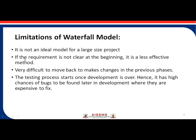The limitations of the waterfall model: it is not an ideal model for large-size or completely new projects. If requirements are not clear at the beginning, it is less effective. It is very difficult to go back and make changes to a previous phase — for example, moving from testing back to coding is not possible. Also, testing starts only once development is over, leading to a high chance of bugs found late that are expensive to fix.